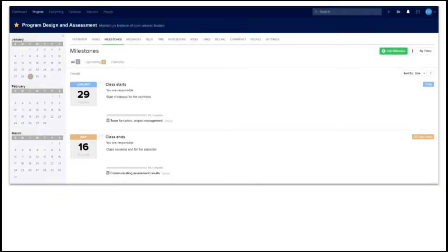Likewise, inside the project management systems, normally you have some kind of a calendar system, and that lets you schedule things like milestones and put in those fixed dates of things that will happen. So for instance, in the DNA class, we know that we will be ending class on a certain date, and we know with pretty high reliability when the presentations will be scheduled for. So you could go ahead and put in those things as key dates or milestones for your project.